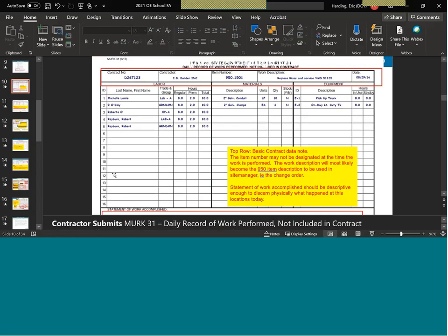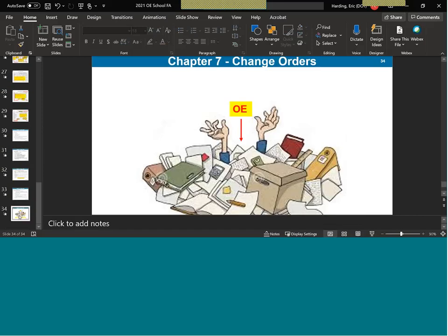As Amy said, that doesn't mean that what you're going to do is just not pay them for the production item. But that's an example where it can be very hard to know, and the MERC 11s could reflect the whole production work on obstructed and unobstructed drilling. As was said, it's not really cookie cutter. It's not a one size fits all scenario. You've got to take it as each individual situation. But that could be an example where you wouldn't pay the production item.